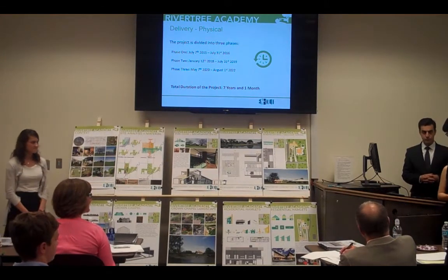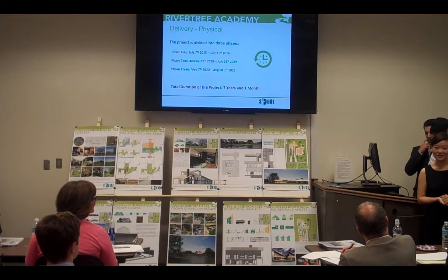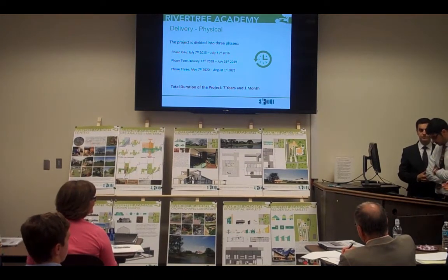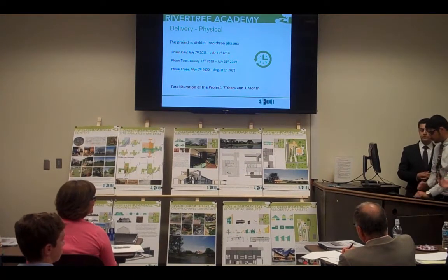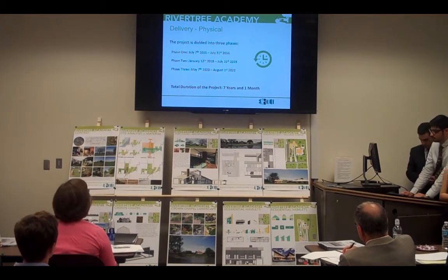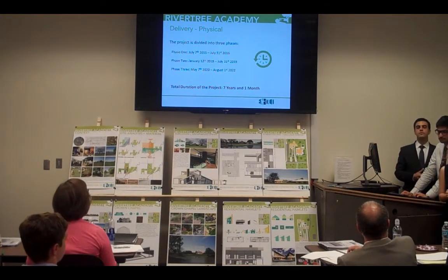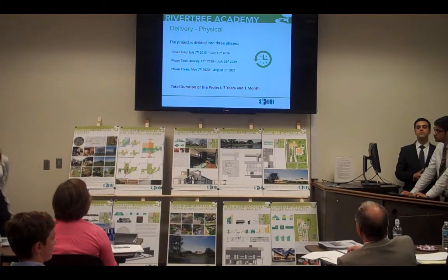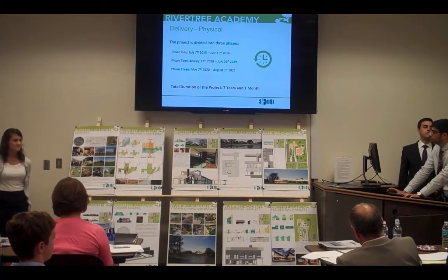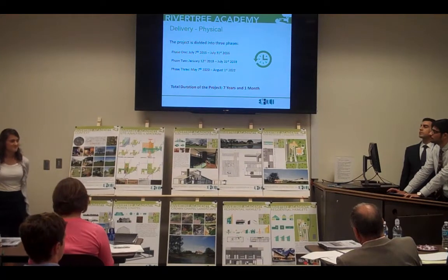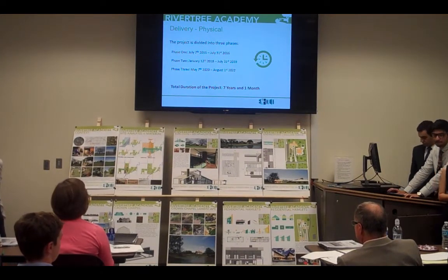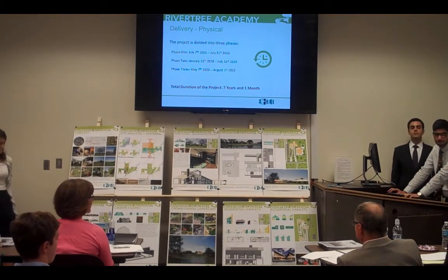Hello everyone. My name is Meng Yanxiao. I'm from China and I'm presenting the construction schedule for the River Tree Academy project. As we can see here, the River Tree Academy project will be carried out over seven years and one month. It starts on August 1st, 2015 and will be finished in August 2022.